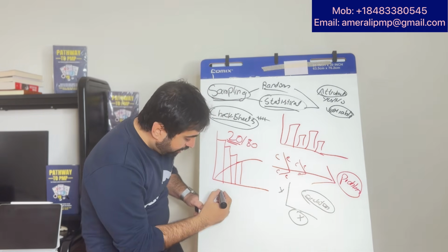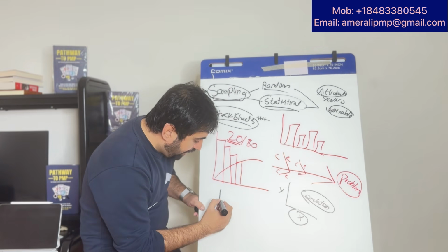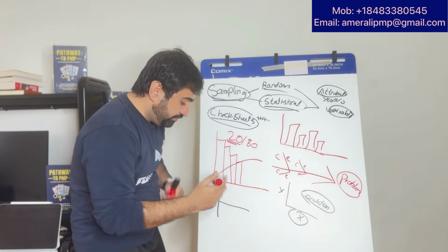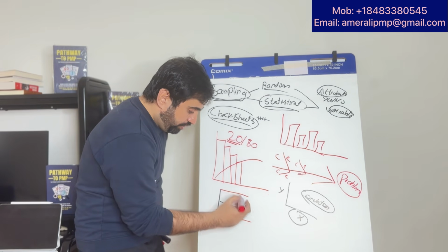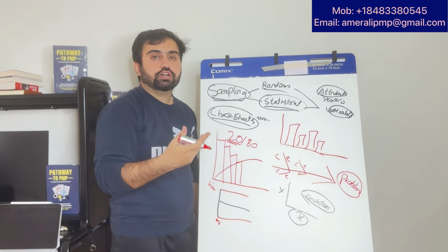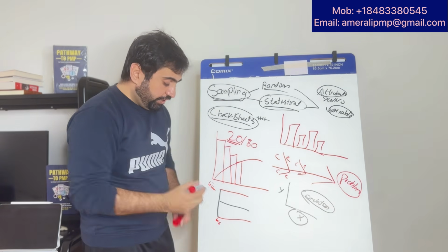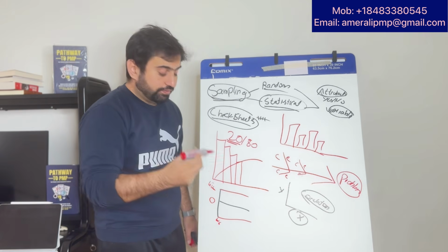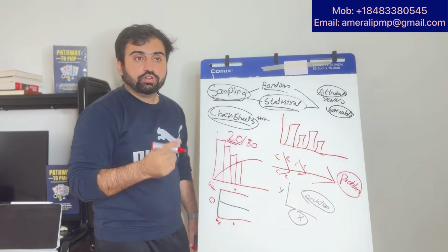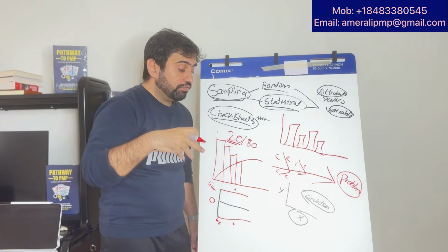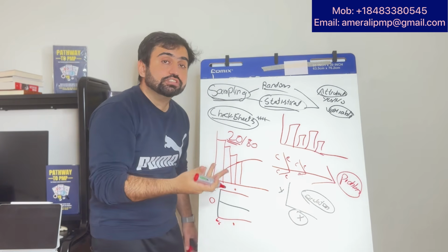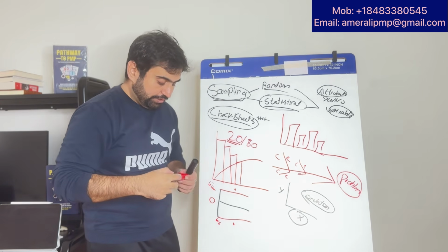Then we have control chart. Control charts are very important charts that are used in process. They have upper control limit and lower control limit, UCL and LCL. So basically we look into whether anything goes above our upper control limit or below our lower control limit; that is called special causes. We investigate why did this happen. We need to look into what was the problem, why it was not identified, and of course then do the root cause analysis into it.